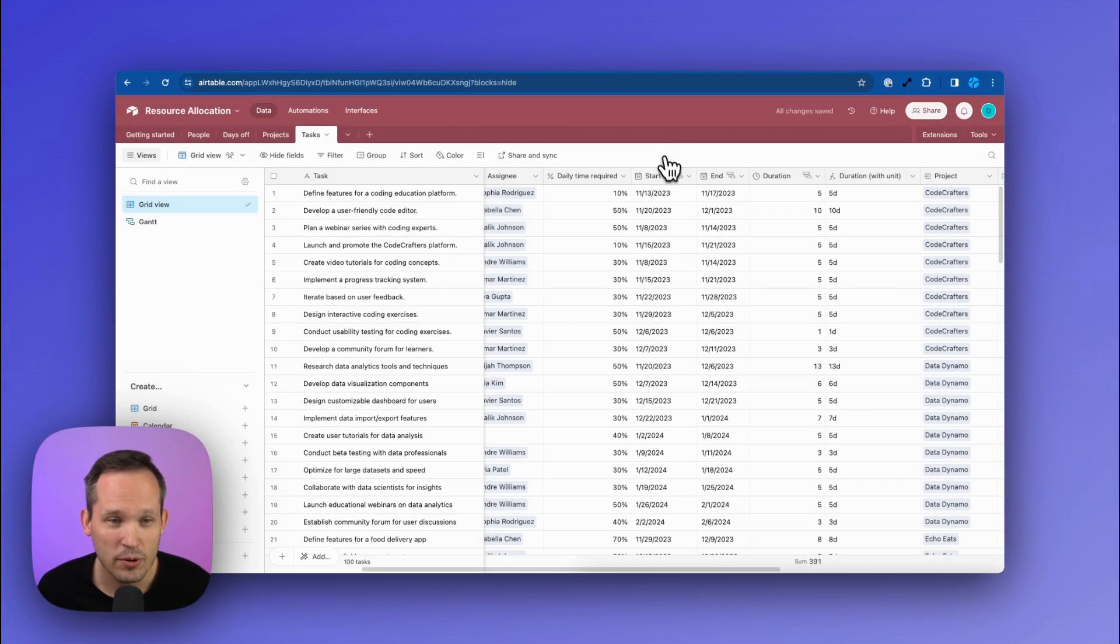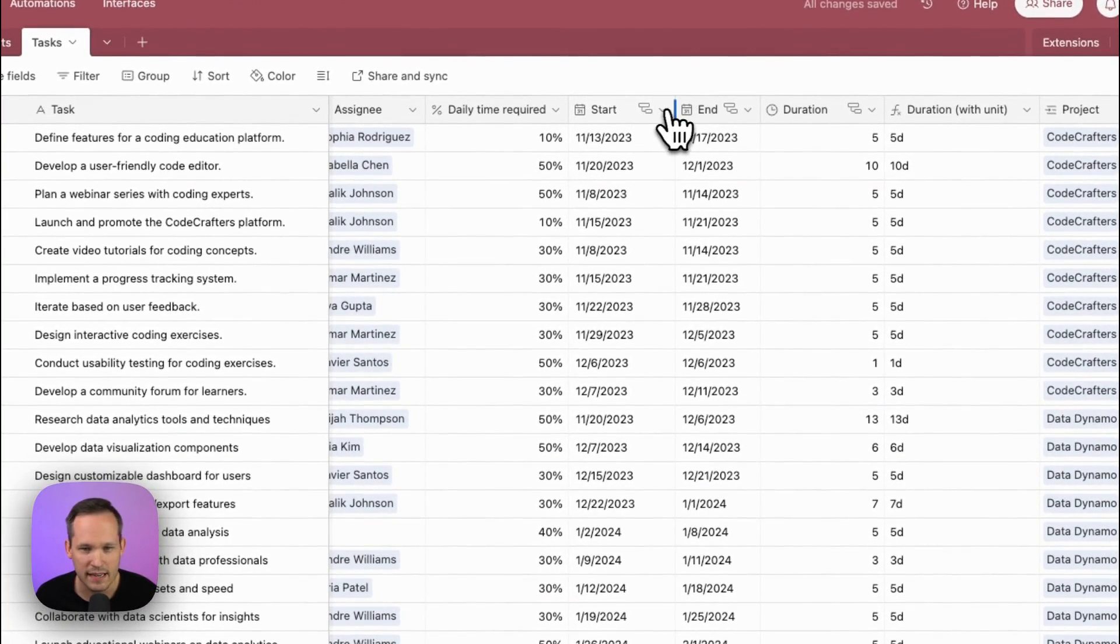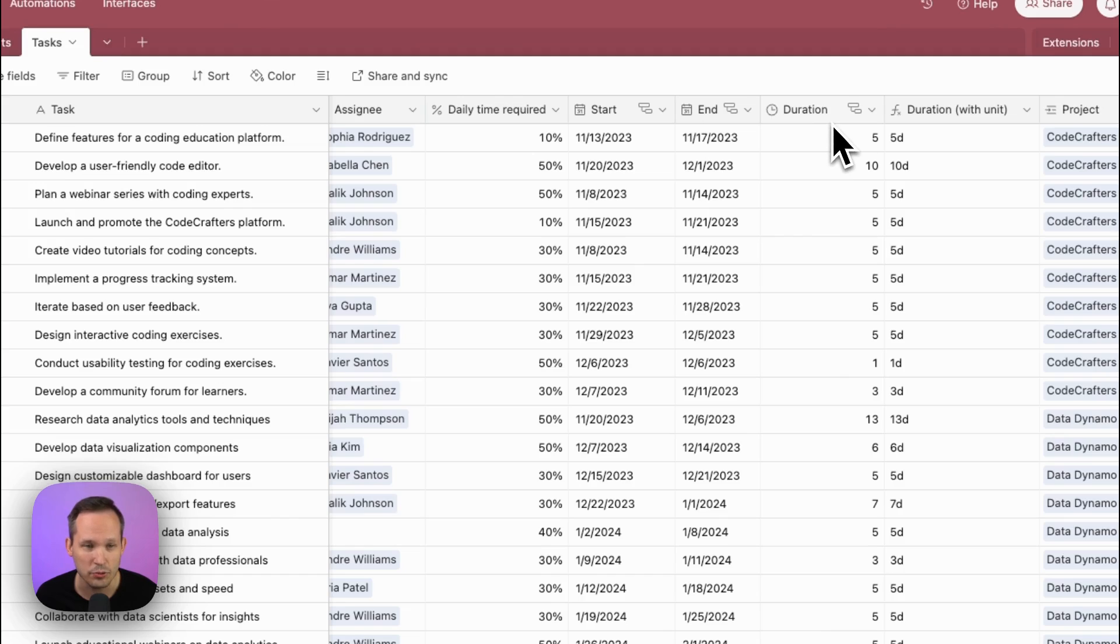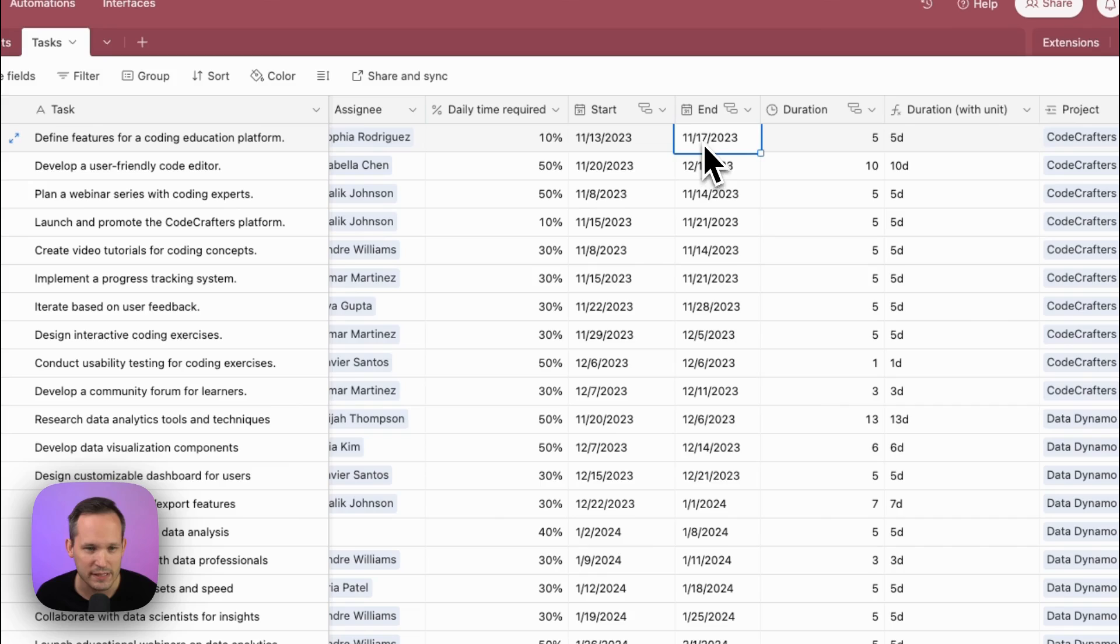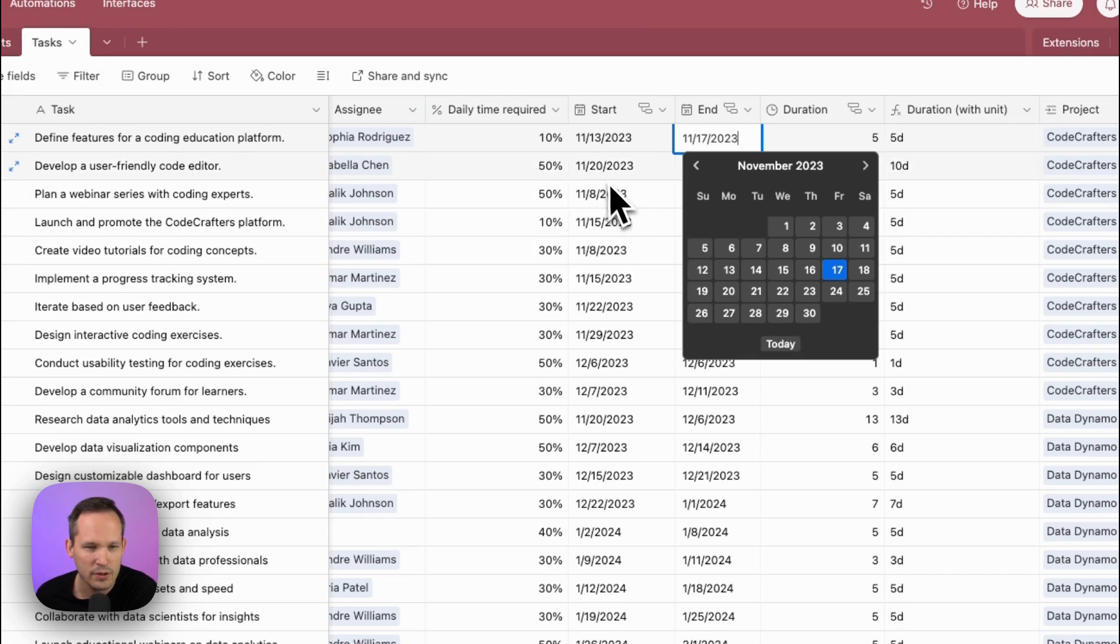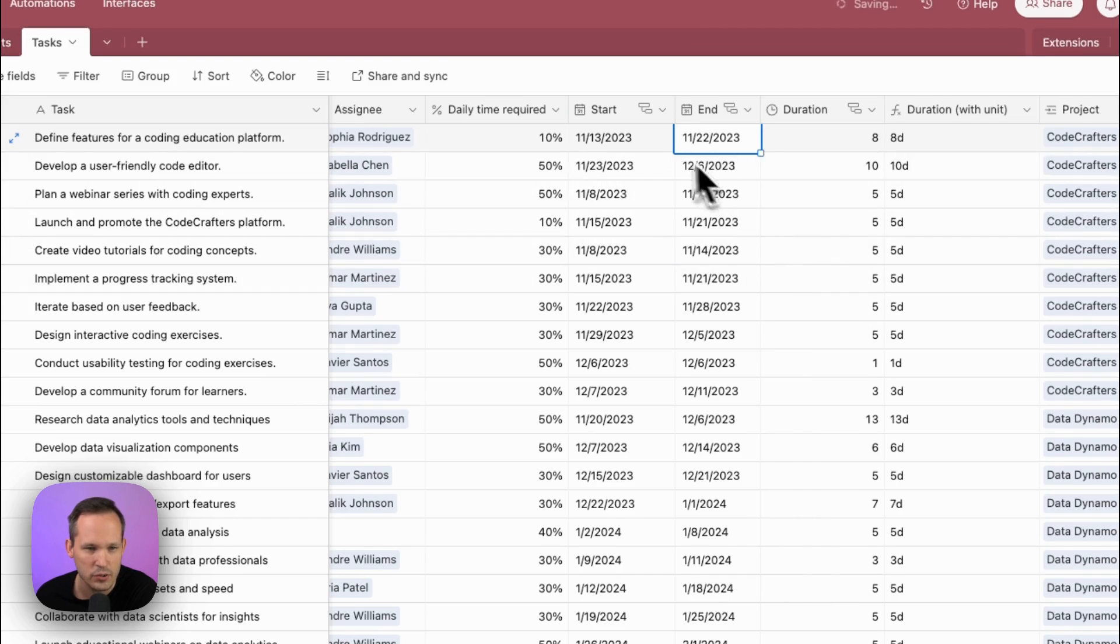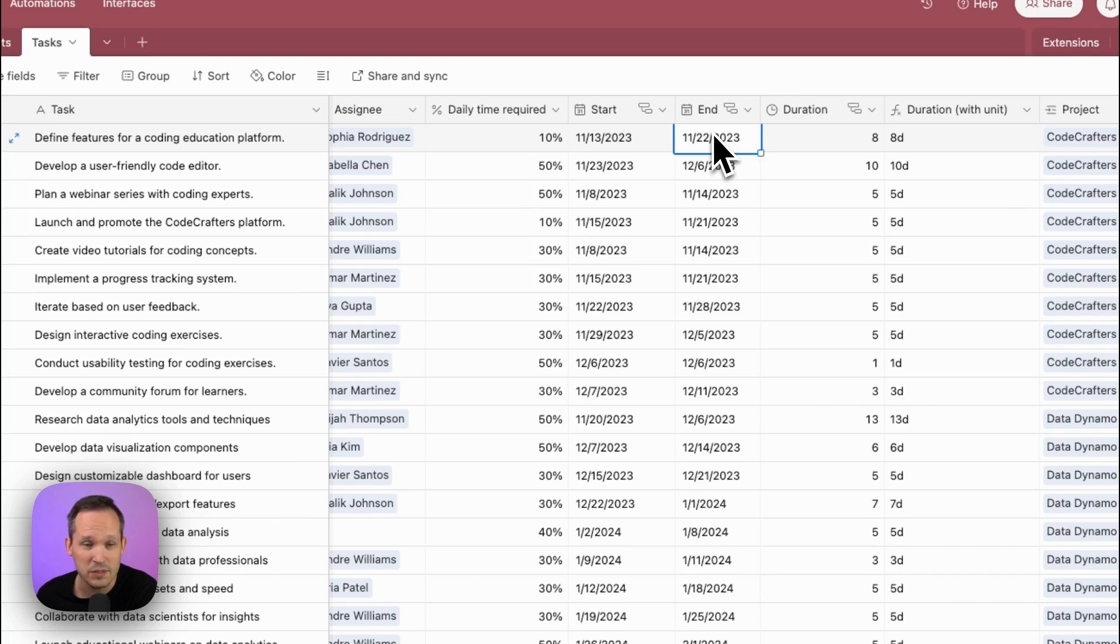So when we save this, notice that we see this new little icon that displays next to the fields that we need, the start date, the end date, the duration. And so in this case, we have a predecessor task. This task number one comes before task number two. And so if we made a change, if we said we're working on this project and we actually need to bump this out until the 22nd that it's going to finish, notice how this is going to change the next task after it. So I'll change it to the 22nd. And boom, immediately this updates. Now this starts on the 23rd, because it was waiting on this previous task in order to complete.